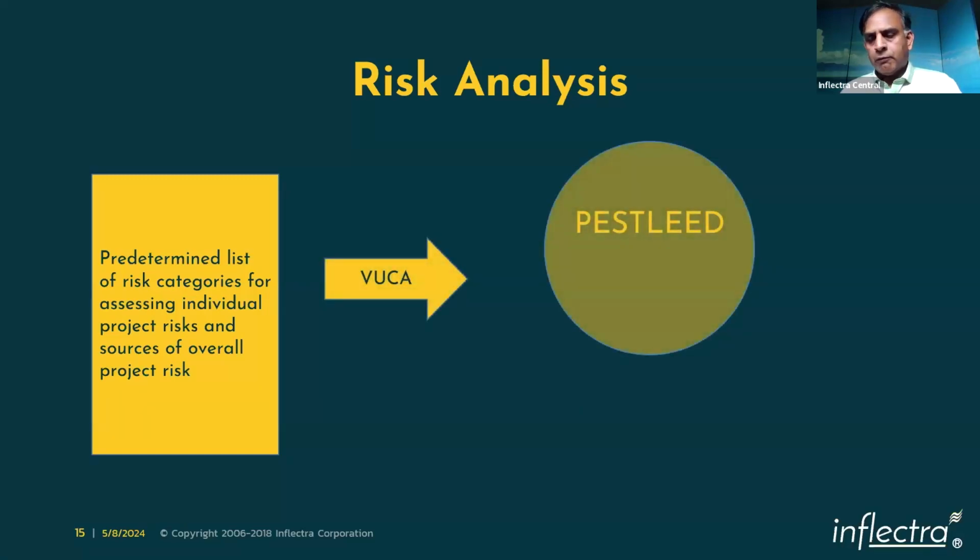Now, we all live in a VUCA world, a volatile, uncertain, complex, ambiguous world, right? There are different techniques or frameworks that help you in how you should categorize them. One is the PESTLE framework. I added an additional E and D, ethical and demographic dimensions, because people missed that out. PESTLE stands for political, environmental, societal, technical, legal, and economical. And the other E and D stands for ethical and demographic. That's just one category of looking at large scale projects, portfolios, and programs and stuff like that.